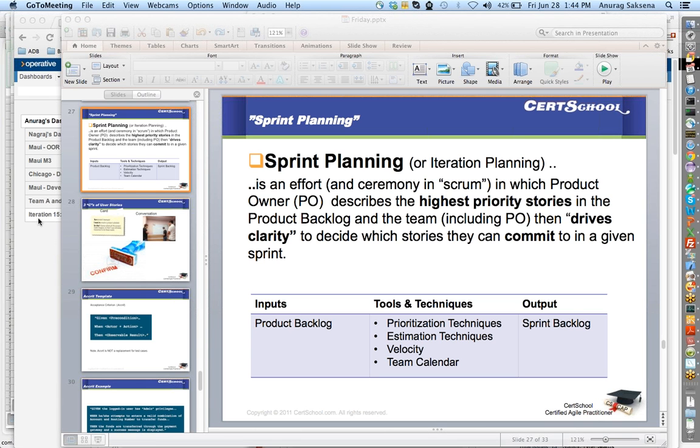A lot of teams, once they finish the sprint, do just sprint planning for the next sprint. They don't start sprints back to back. They time box 2 or 3 days in between two sprints, just to do the sprint planning, which is also another way of handling being agile. But you want to do what works for your team.